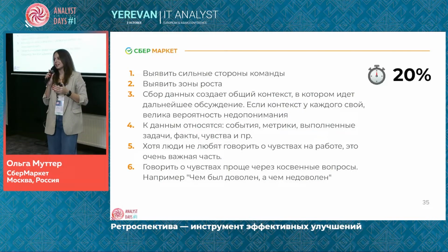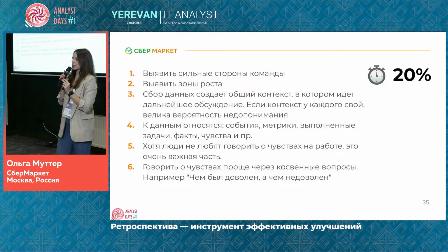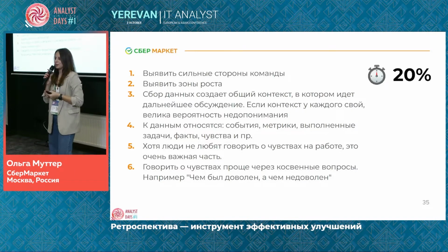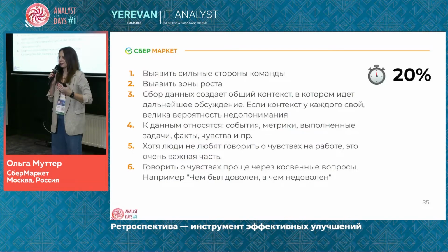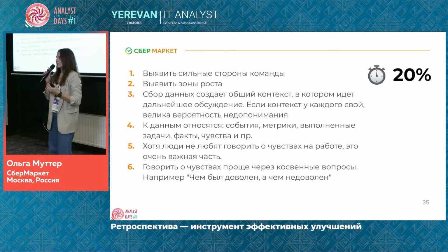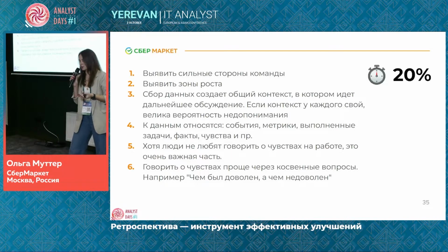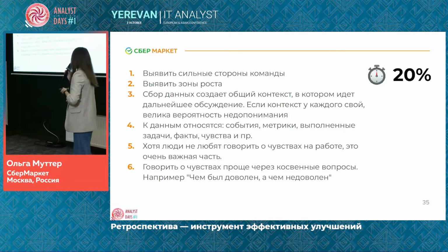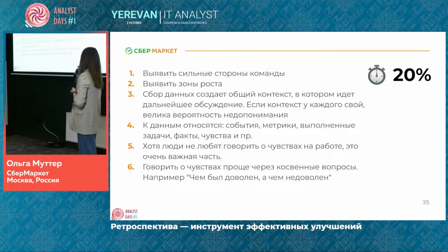It's a big mistake when the data collection is all about problems only. It's a template where we start discussing only problems that we're experiencing, only negative stuff. And I can tell you right away that nobody would want to attend such a retrospective where people speak only about problems. That is why during the data collection, you identify the strengths of the team, why we're great, what great things we have done during the last sprint, and so on.